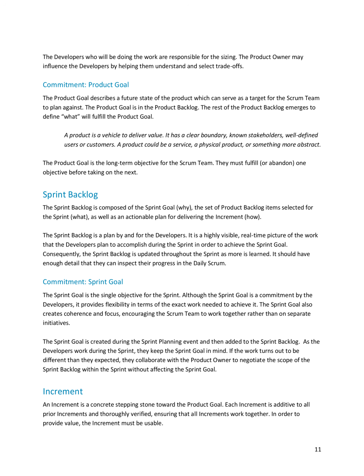They must fulfill, or abandon, one objective before taking on the next. Sprint backlog. The sprint backlog is composed of the sprint goal (why), the set of product backlog items selected for the sprint (what), as well as an actionable plan for delivering the increment (how). The sprint backlog is a plan by and for the developers.